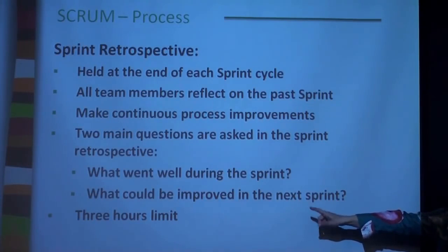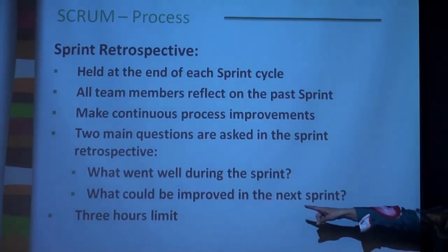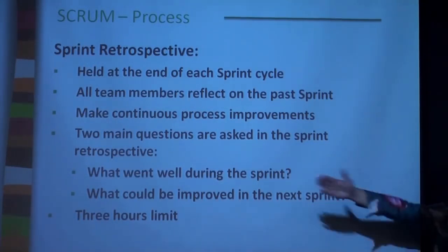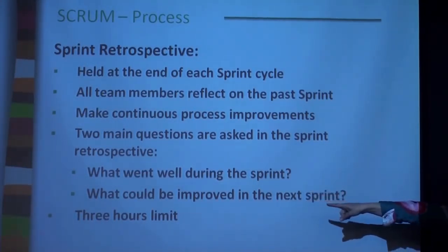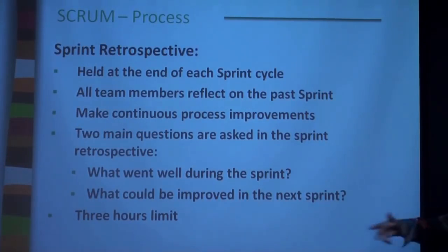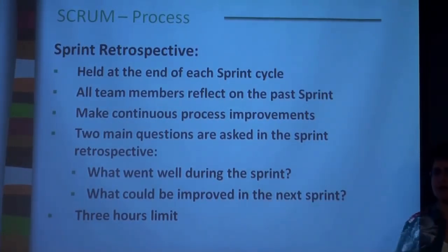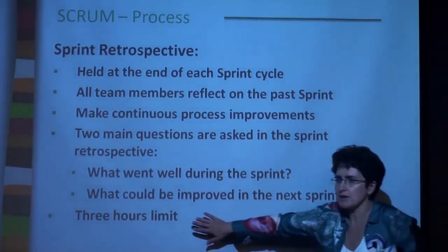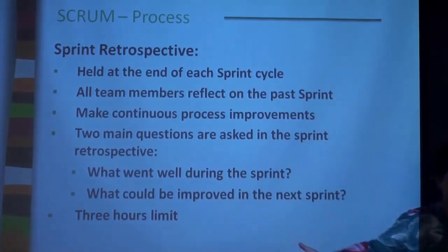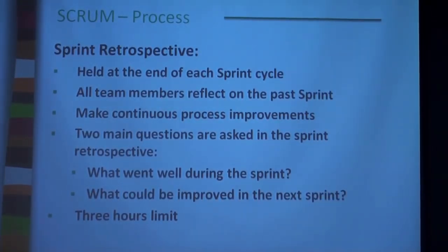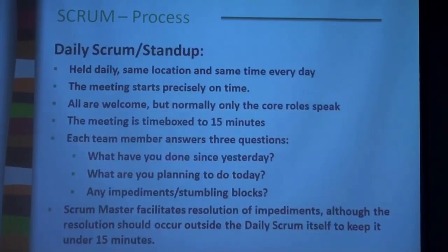If you only have 1 week, for example, which is 80 hours, these 3 hours is too much. If you have four weeks of sprint, you can accommodate a 3 hour meeting. If it is only 1 week, you do not need 3 hours. You may be done in half an hour, because everyone remembers what happened during this week. So it's not like you have to spend 3 hours. If you can be done earlier, good. If not, try to finish this meeting in 3 hours.